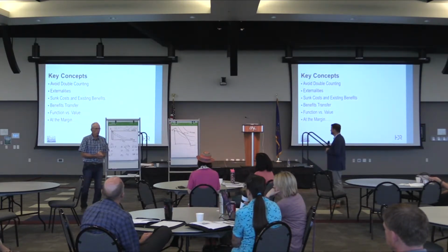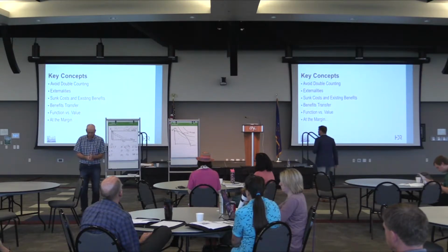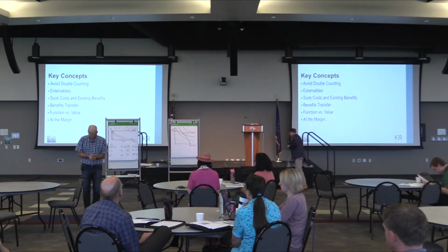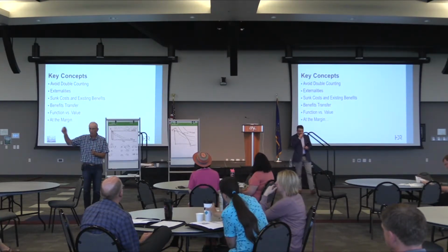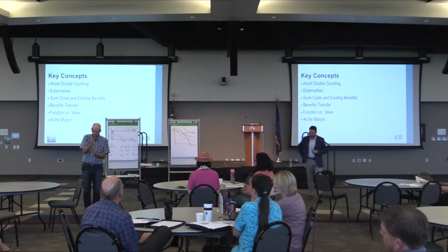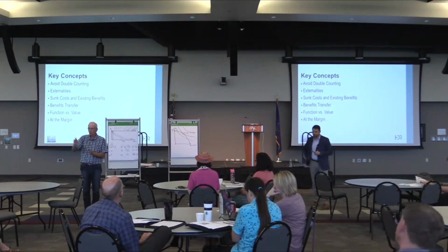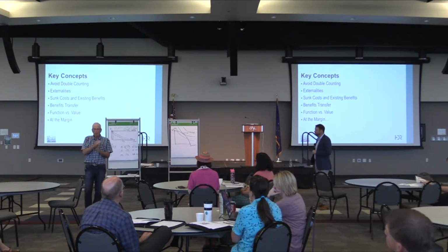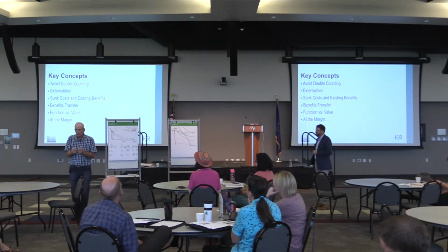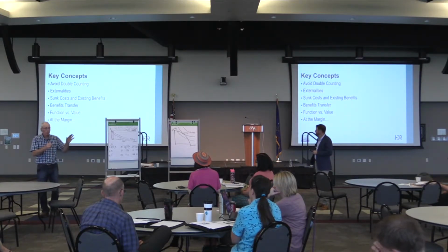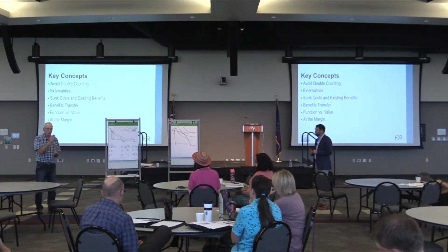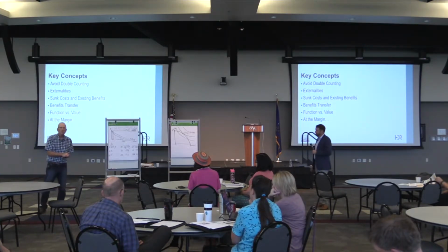Sunk costs: when you're doing economic analysis, the money that you spent up to the time you start the economic analysis is irrelevant. That's all sunk cost. You just look from this point forward, including any existing benefits. So the scheme is to try to spend as much money on the project as you can until you get to the benefit cost analysis, and you don't have to consider all those before. But sunk costs are not part of efficiency analysis. It's only from this point forward.